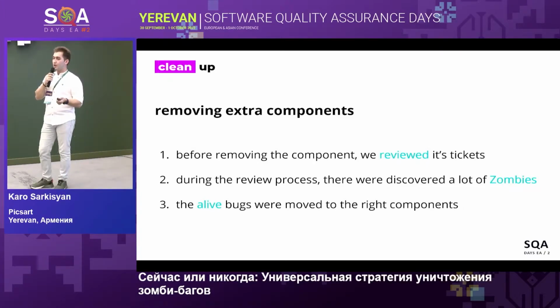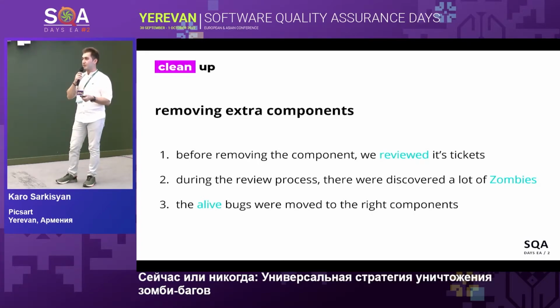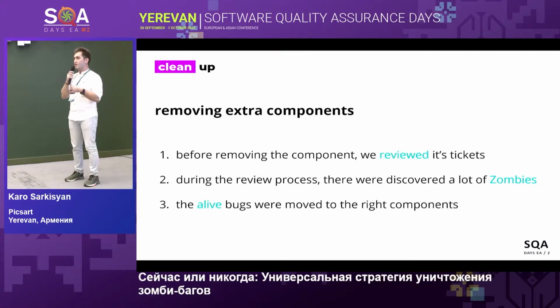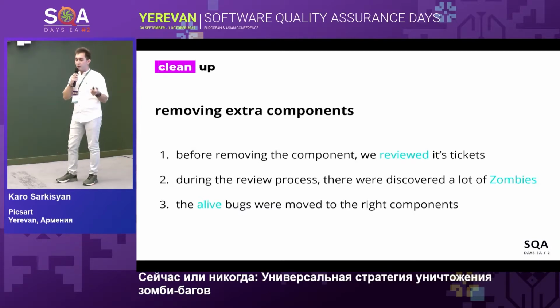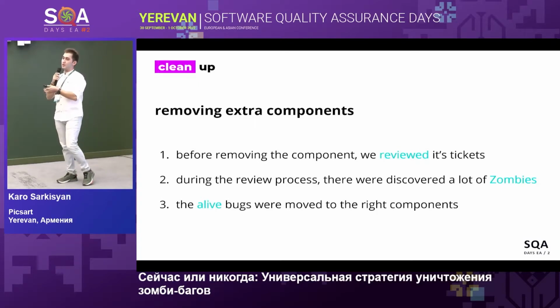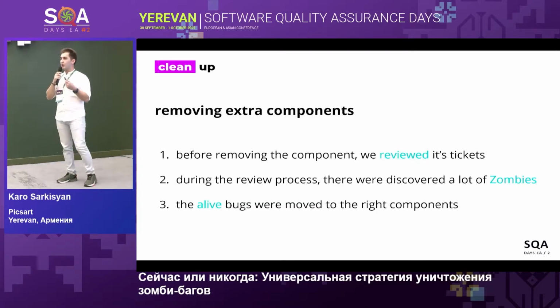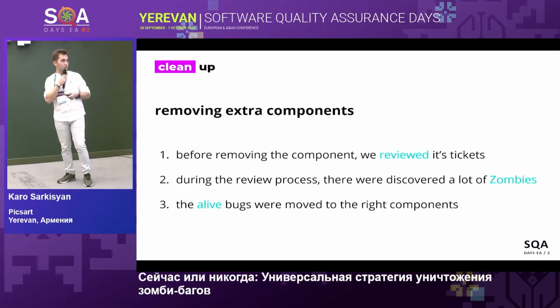Also, in Jira it is possible to set a component lead who will be responsible for all tickets under the component. In our case, the component lead is the engineering manager who is responsible for the development lifecycle. So if we have valid components and we set a component lead, we will be sure that each ticket has an owner and has a component.